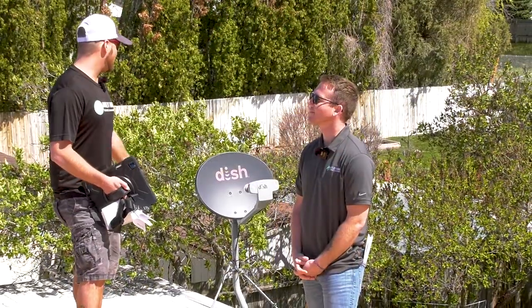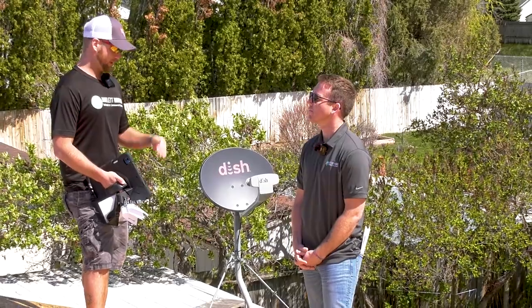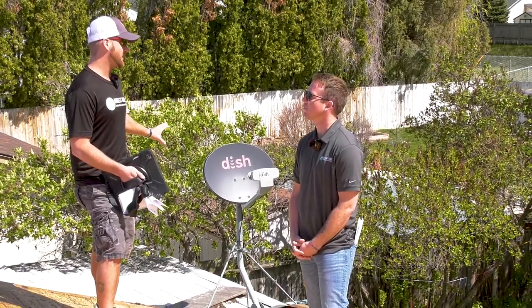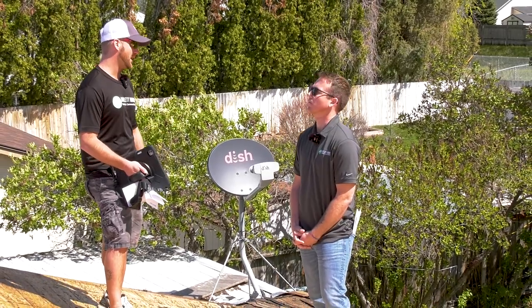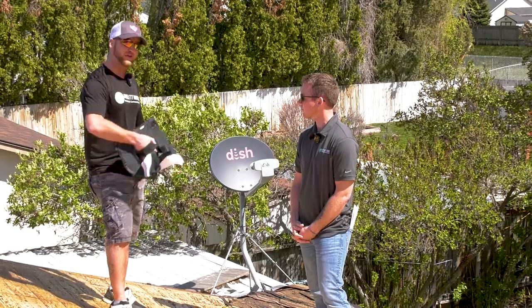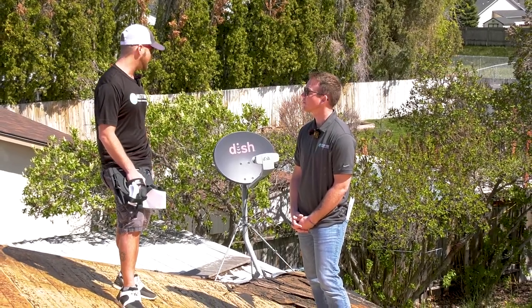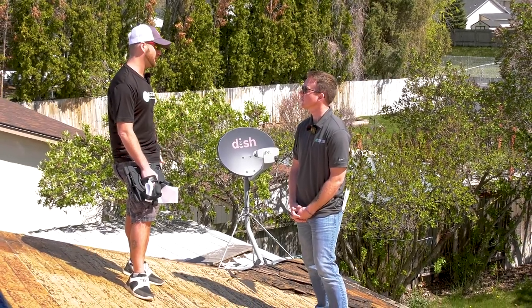So a common thing you will see is when they remove the satellite, it will just be hanging. Typically as the QC rep, you just wanna coordinate with your crew that that's the last thing they do and that it's just hanging from the roof for a very minimal time. Usually the crew will tear off the entire roof, wait to tear off that section until they're actually ready to remove the shingles and paper it.